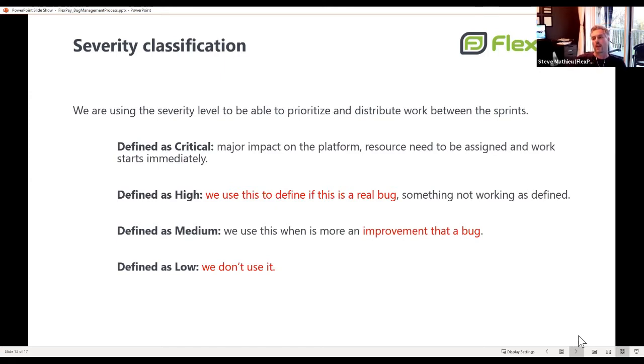So when we do the triage to prioritize the bugs, we're using the priority first and severity second to create the ordered list of bugs. So if we want to start a sprint, we use that priority list to grab stuff that we have defined. We have someone that is more, say, a UI guy. So he's starting in priority 3, that it's UI, to do the bug stuff, and maybe he can go in the code depth if he can fix it.